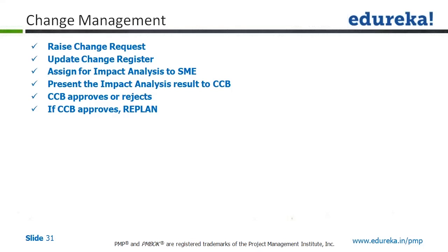Once we raise a change request, the change register gets updated. We also look at the impact this change is going to bring onto the various other processes. And we also involve the subject matter experts to look at whether the changes we are going to bring in would lead to any such impact onto the other processes.